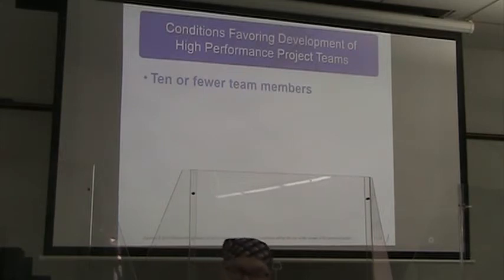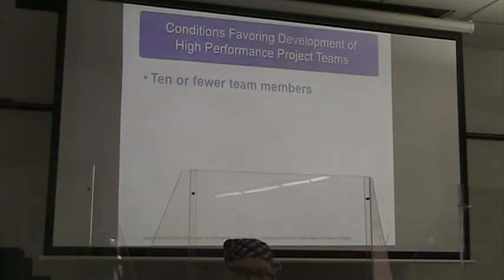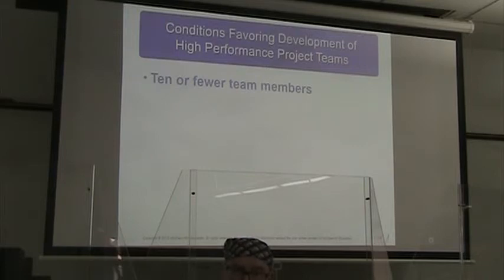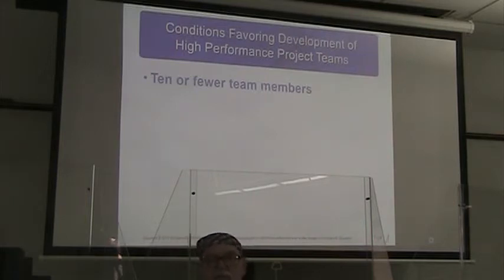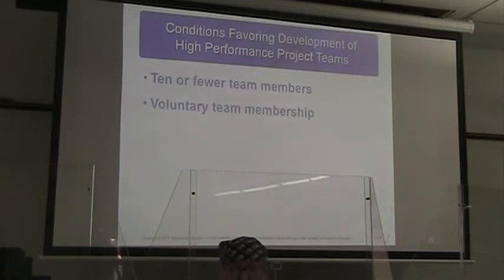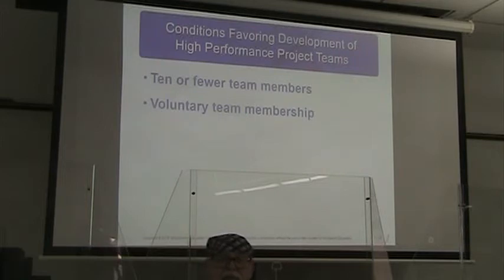What are the conditions that favor development of a high-performance project team? One thing is a smaller group — they list ten or fewer team members. It is true that the fewer team members we have, the easier it is to make personal relationships. Voluntary team membership also matters — if people ask to be on the team rather than just being drafted, that is definitely going to influence how they feel about the project.